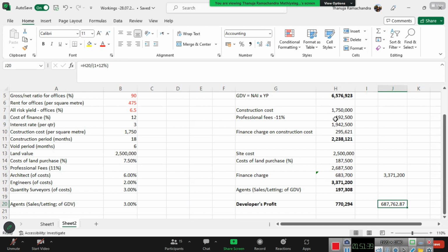Inflation is there, and the cost of capital is there, so the 1,000 earns interest. Therefore, the money value does not remain the same, so we need to do the appropriate adjustment. So 1,000 becomes 1,331 after 3 years, and the current value of that is 1,000.